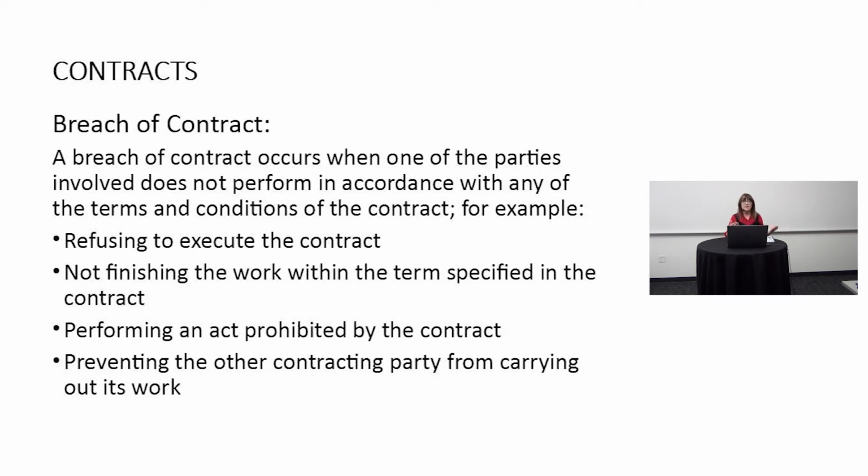This is a big one that comes up. They'll give you a finish date. If you don't finish on time, you may be in breach of contract, and you may have a penalty, a daily penalty. I have been on some contracts that had a $3,500 a day penalty for not finishing the work within the term specified.